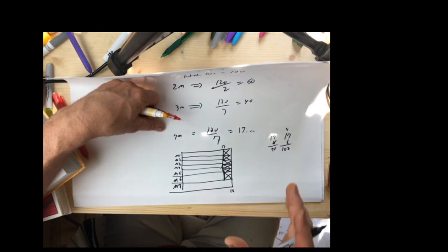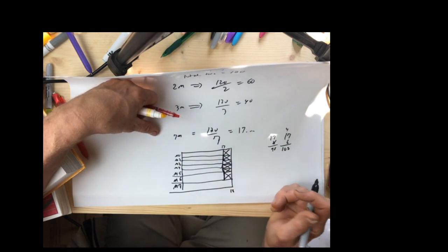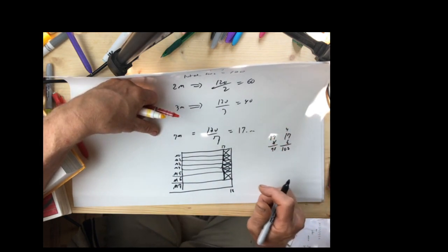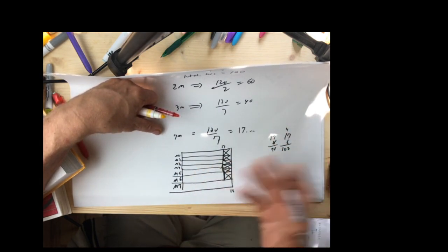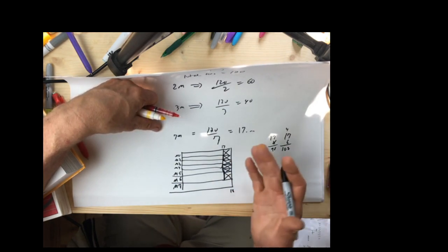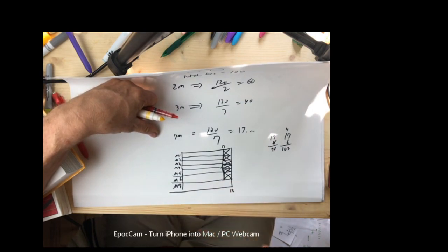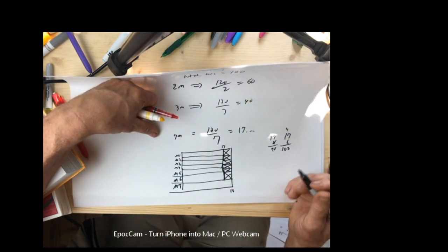that if we didn't have tasks divisible into smaller amounts of time, they have integral parts, this is a great schedule. You couldn't expect 7 machines to do less, because as soon as you move that one less, you haven't done all of the work. Of 120, you would have done only 119.